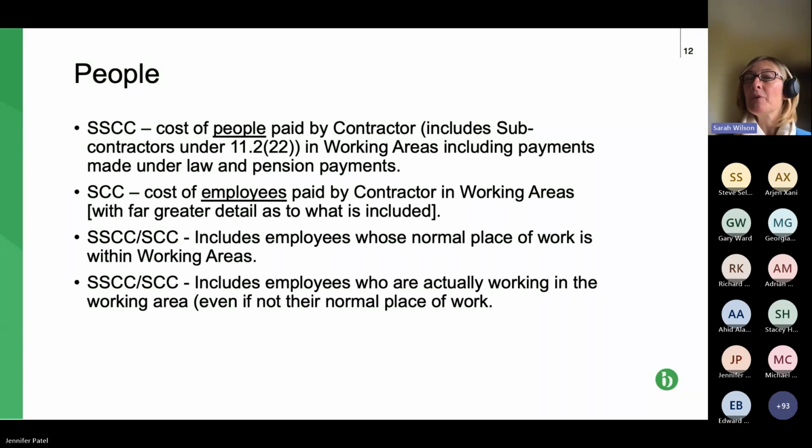You know, I think if it was 80% of the time usually working there, you're clear. 50% probably not, because how can it be normal if you're only working there half time? So that's the scenario it's designed to cover, people working in your head office or one of your other offices, or working from home or somewhere else, but they're being shared between several sites.